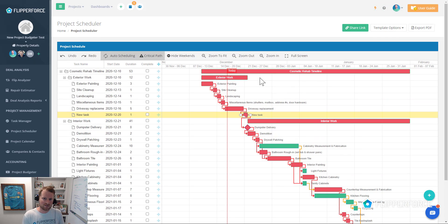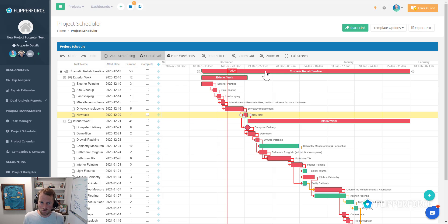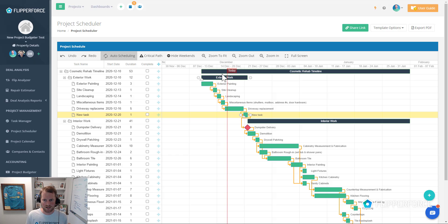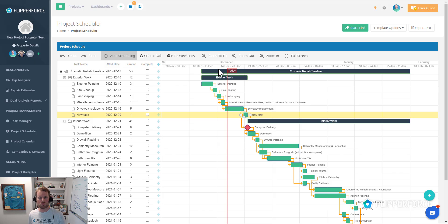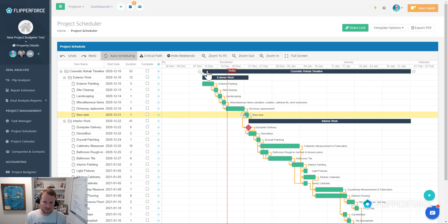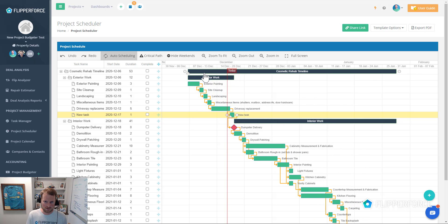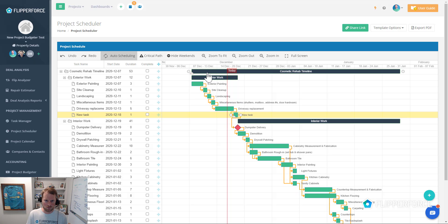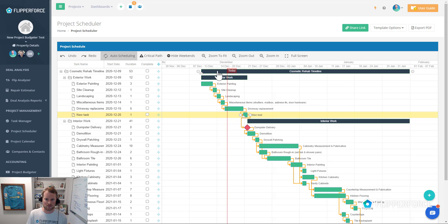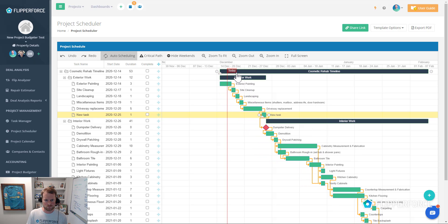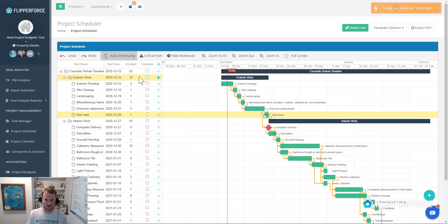Again, what gets asked a lot is how do you change the overall start date or the overall duration? Those durations are based completely on the subtasks below it. One final trick: if you want to shift the overall project timeline to a certain date, you can drag and drop the entire duration on the Gantt chart. For example, if you wanted to move the entire project to start on the 15th, you can just drag it over there. Watch that start date as you're doing it and it will shift everything.